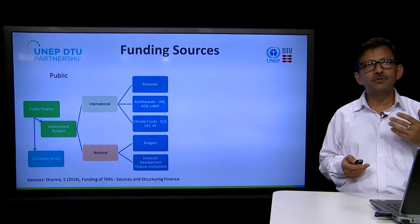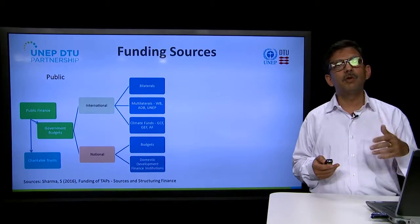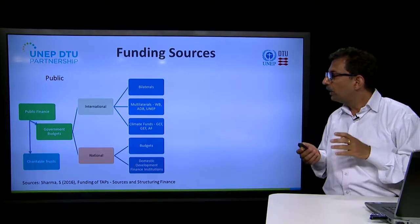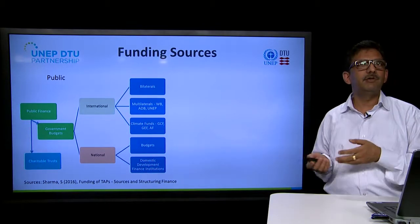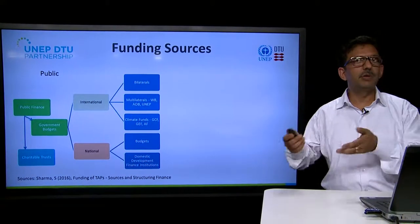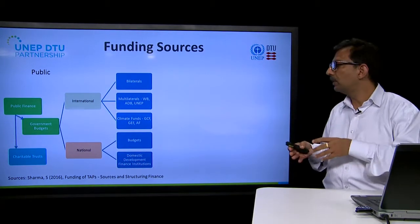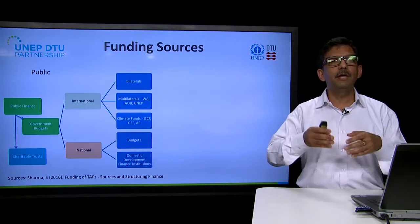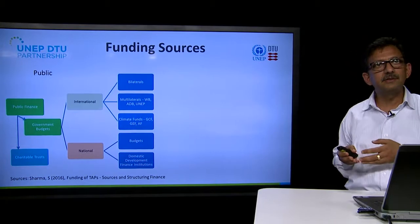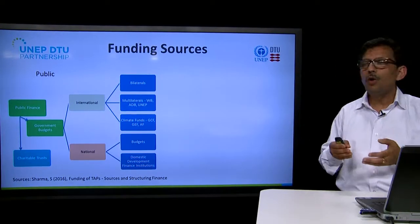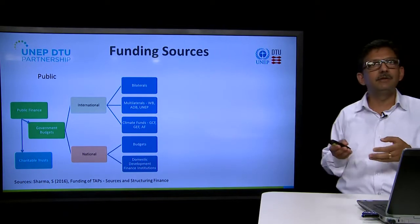Coming to funding sources — once we have identified the budget for each action, we need to look at who is going to fund these actions. Funding could come from the public and private side. In terms of public funding, we generally talk of funding provided by government budgets, charitable trusts, institutions, and emerging foundations. Government budgets used within a country represent national funding, while government budgets used outside a country represent international assistance — which could be bilateral assistance, or multilaterals such as the World Bank, Asian Development Bank, or climate funds like the Green Climate Fund and GEF.